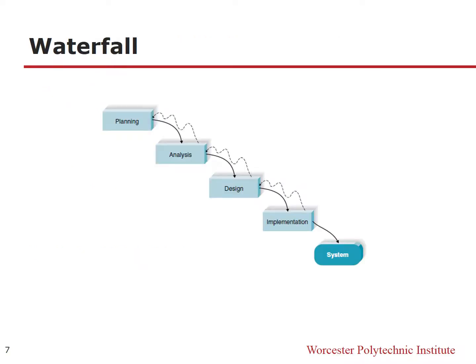First, let's see the waterfall. The waterfall model strictly follows the SDLC, and you can see it go through the SDLC step by step, and the deliverables of each step could be hundreds of pages. But that also leads to the biggest drawback of this model. When there is a new change on the business side, such as adding new functions or adjusting functions, everything in this model will be changed.